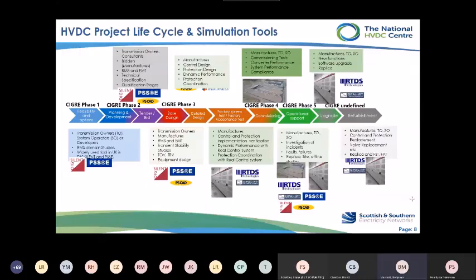That's a device focused approach. Now, as you move out of the factory, there may be further analysis that happens as you approach the point of commissioning, certain retunings occurring, and then you're into service. And again, there will be snagging, there will be software updates, there will be other revised tuning as sequentially the capacity is brought on stream.